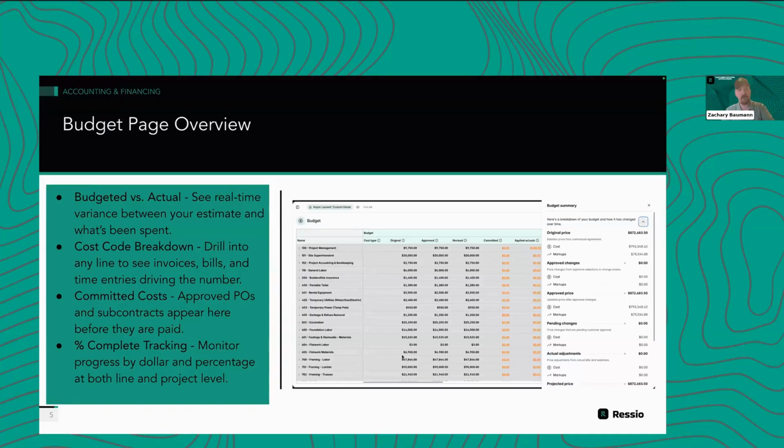Awesome. The other thing that we're talking about here, percentage completion tracking, is just a manual entry field. It's called work completion, and you can enter and say, for your team or for yourself, about how far into the work are we here? I think we'd love to see some automations there in the future where schedule can be tied back in. There's just not a direct connect between those at this time. So you can come and say, I think we're about 50% done with this work.